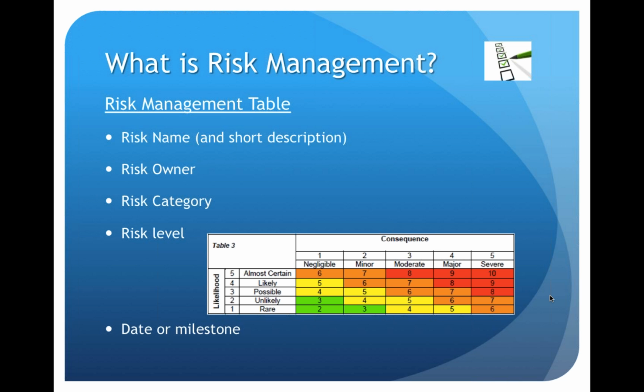That's basically trying to point some reference into those risks, meaning this risk can materialize on this milestone of the project, or it can materialize up to this date. After this date, it might not be relevant, or if we pass the date, then its materialization should be actually obvious to everyone. For example, if the product is delayed to QA after, I don't know, August 3rd, then we're going to miss the deadline no matter what happens. So that's going to be your date or your milestone.